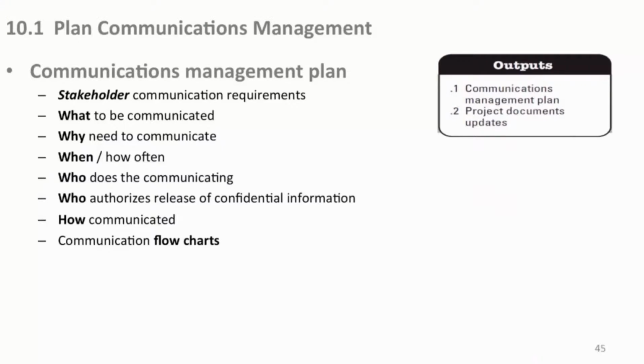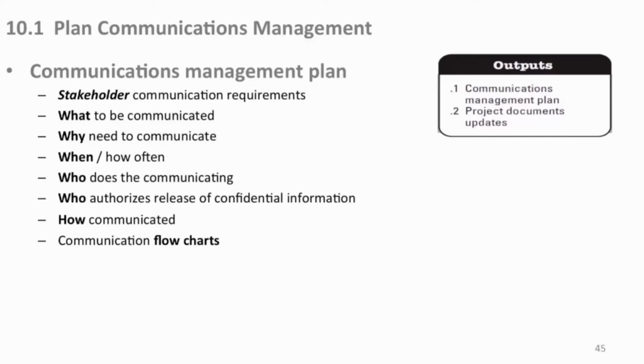It may differ between your stakeholders. Who does the communicating? Do you do it yourself, as project manager? Do you have an admin staff do it? Maybe a stakeholder wants to know, as somebody's working on a WBS, some work items there, a work package, and we'll learn about work packages later. Maybe he's particularly interested in a particular work package, and he says, I want this staff member who's working on the work package to communicate with me every day what he accomplished of those work items. If that's appropriate and you agree, then that's a communication method. That's a requirement. You put that in the stakeholder management plan and in the stakeholder register as an approved communication with that staff member. So who does the communication?